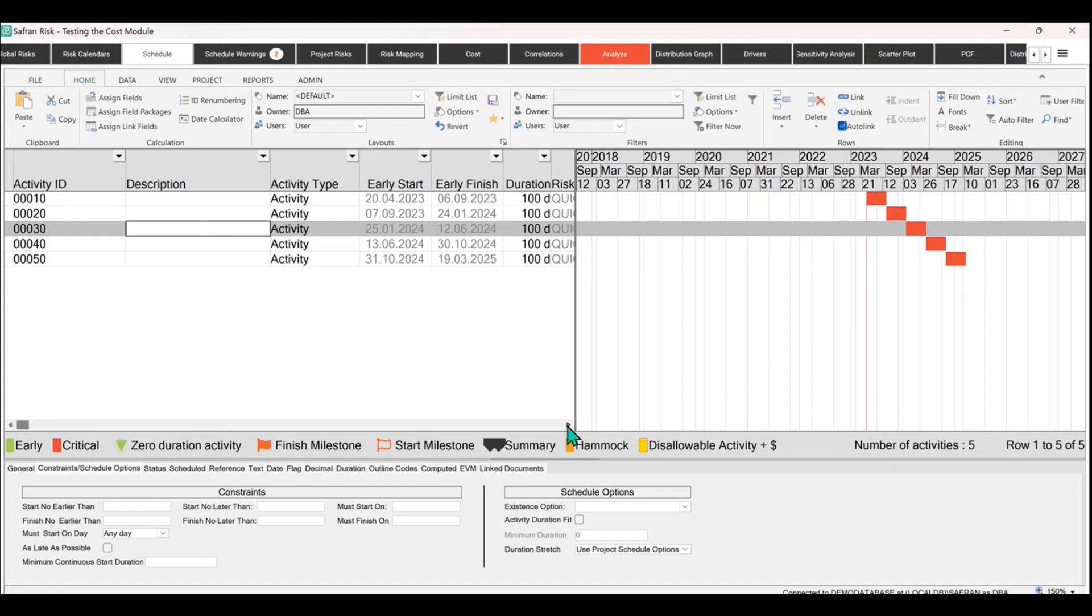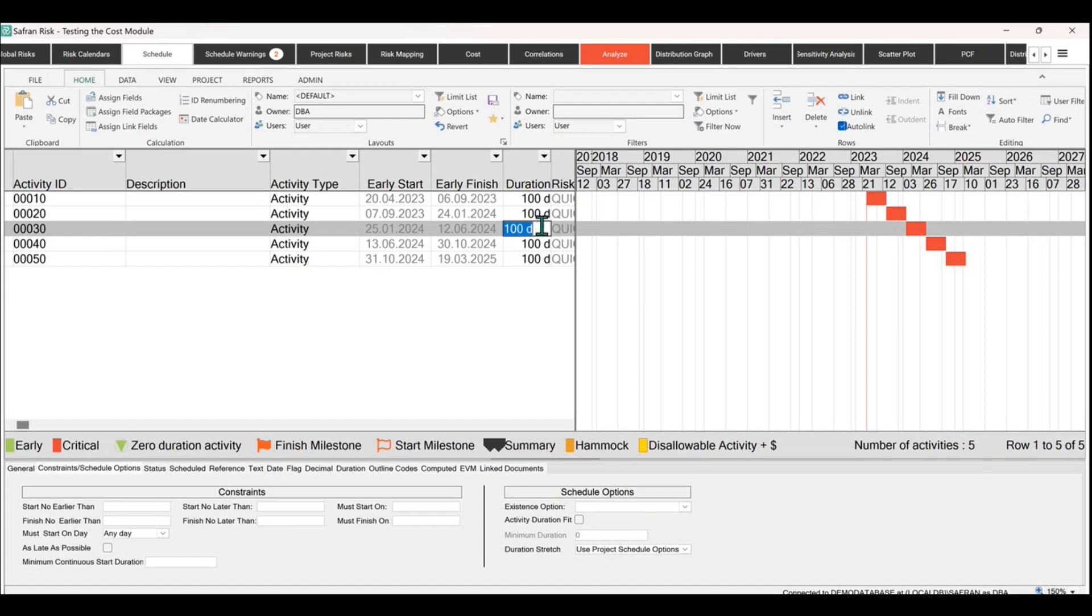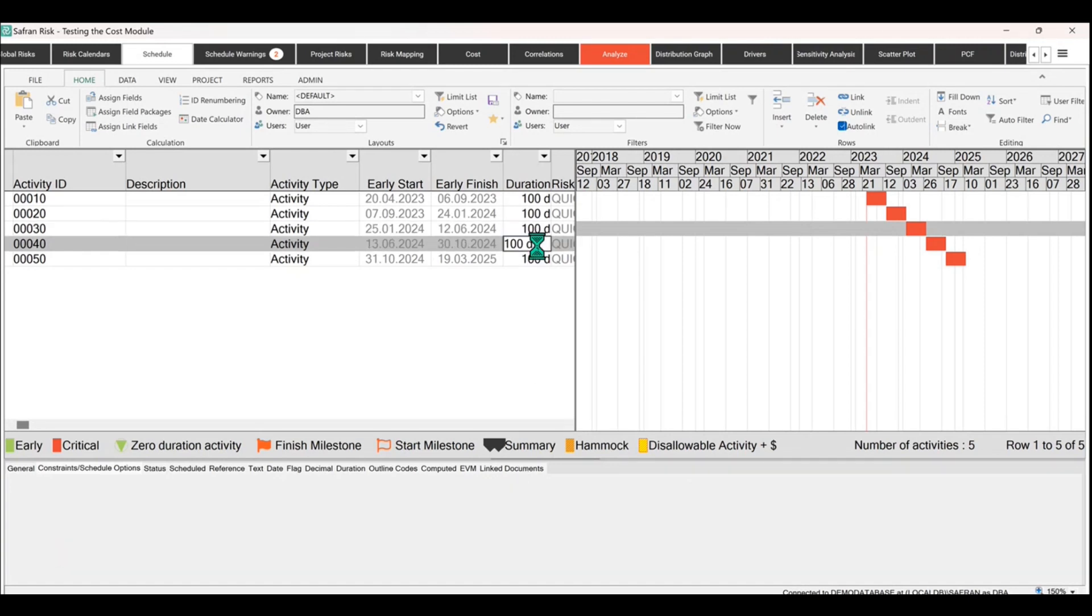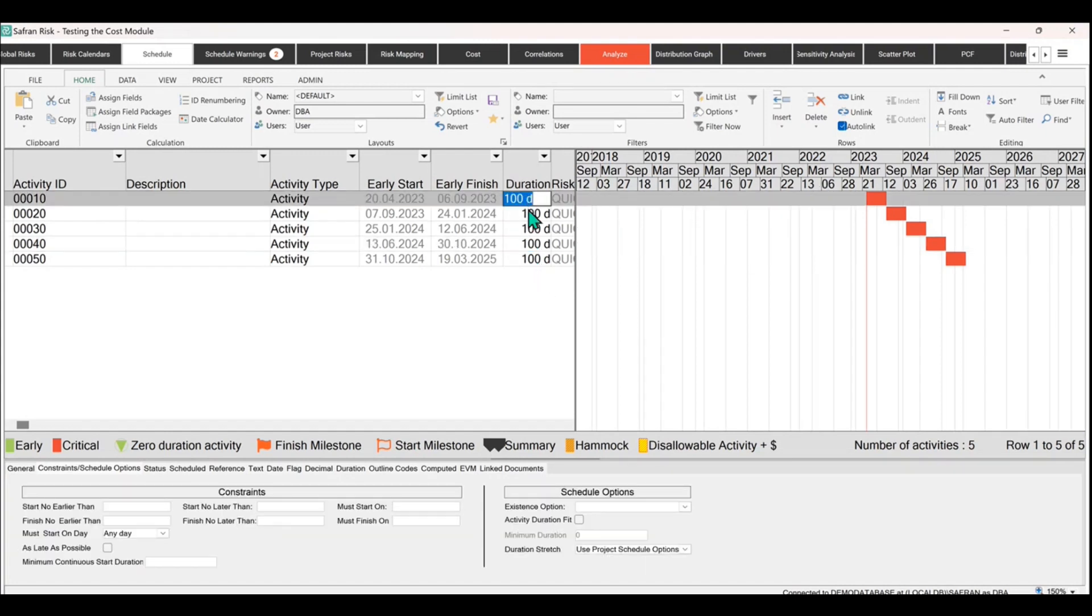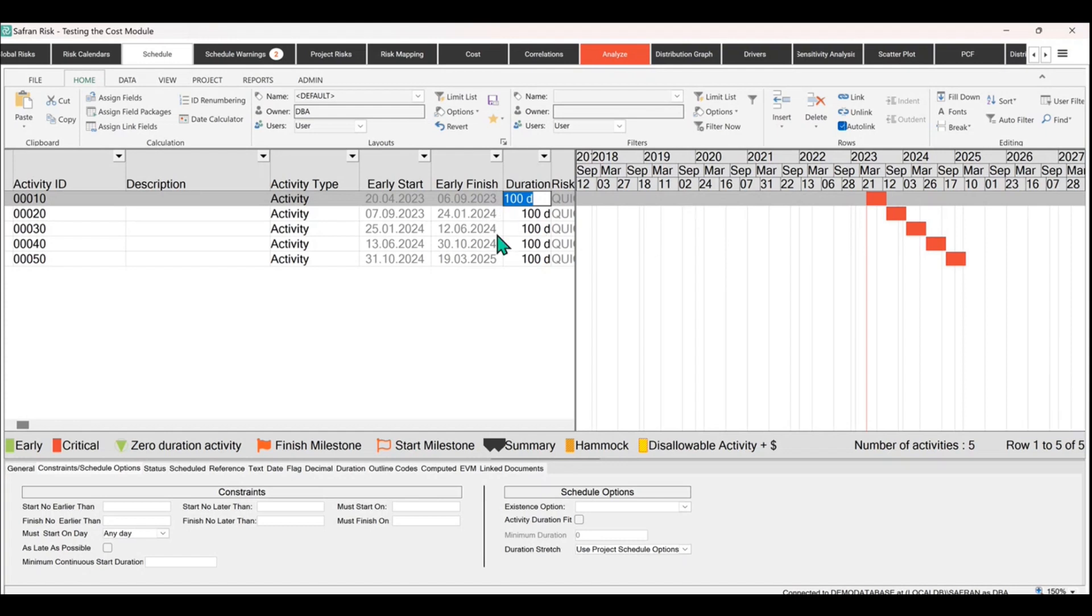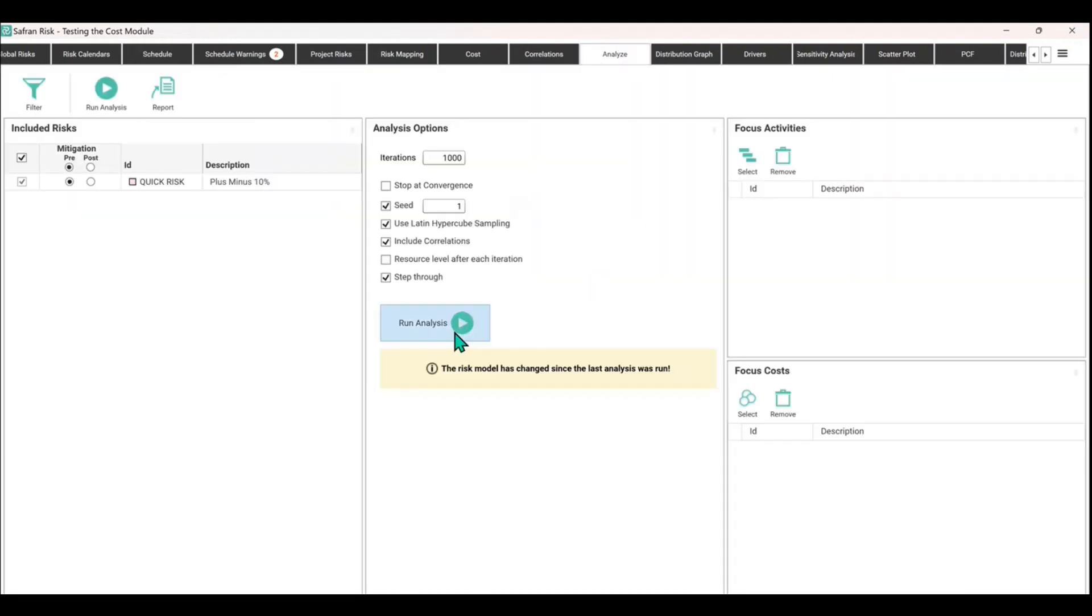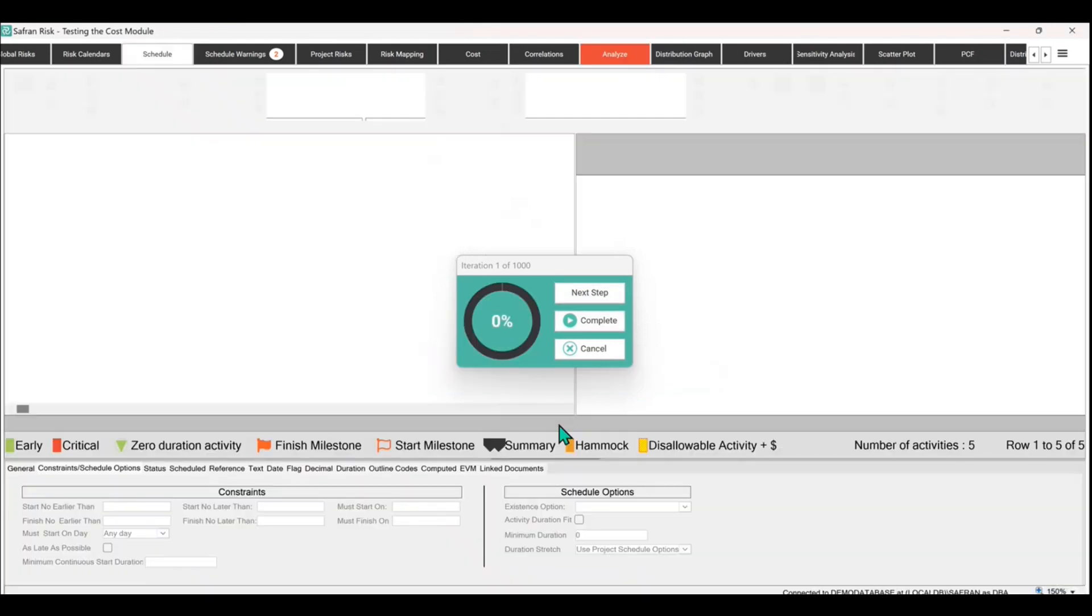That's also useful to know about if you ever have a drop-down menu, like if you're selecting a calendar and there's different calendar types like a weekend working calendar, like a different shift pattern or something. You want to do a what-if scenario, that's a very quick way of toggling and changing rather than clicking and doing one and then the next one. You can do it all in one go. So now plus or minus 10 means that we should see durations increase not by a single day but by potentially up to 10 days or downward by 10 days, so 90 to 110 days each. Let's just now rerun that simulation.